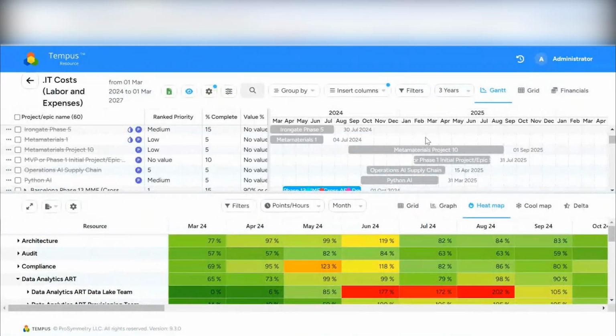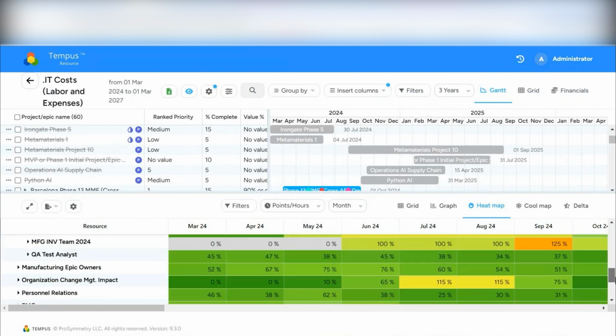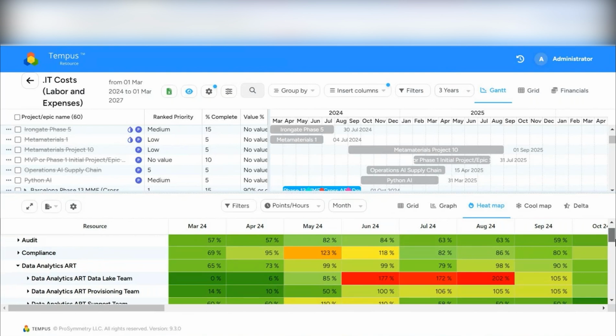Now, another thing that we offer that people love is this whole concept of being able to model. This is simply a digital twin of your portfolio. Everybody gets this. This comes packaged with our software because we consider it vital to the portfolio planning process. But again, as soon as you size your work, it unlocks these capabilities, and you can see by team and by role, all up and down, anybody that's red is overallocated during that period. You can look at this by day, week, month, year, 10-year views, right?